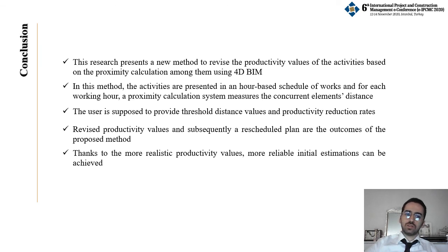As a limitation, the user is supposed to provide threshold values, initial productivity, and productivity reduction rates. The revised productivity values and subsequently a rescheduled plan are the outcomes of our proposed method. And finally, thanks to the more realistic productivity values, more reliable initial estimations can be achieved.